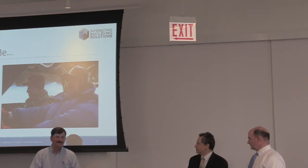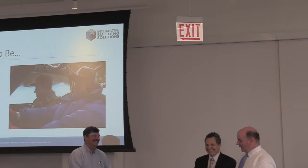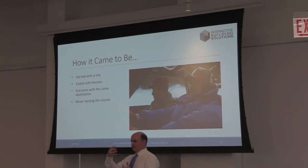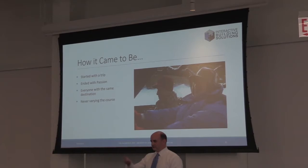Right. And let's all be straight, because if Craig knew how to solder a pipe, he wouldn't need us. That's not entirely true. But I think what Joe says is actually very important. Often what the faculty member says they need creates a list of specifications. Then we have wonderful people in our facilities department who are going to contract on those specifications. Someone's going to deliver exactly what you wrote, and no one's going to come to you and say, sure you really mean that? Is that really what you want us to do? We should ask before we do. You never get that feedback. And occasionally you sit there and go, oh, that wasn't what I meant.